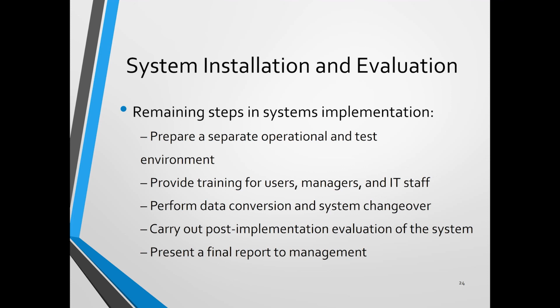How to clean it, you have to do it manually. Some fields you don't want, you have to delete. Some fields are necessary but you have to convert them. For example, in the past we said that the product code started with A, but now you say the product code can start with any number, then you have to know how to change it. If they have a standard for converting the product code, you have to run that program to convert the product code, and then do the next field or next column.